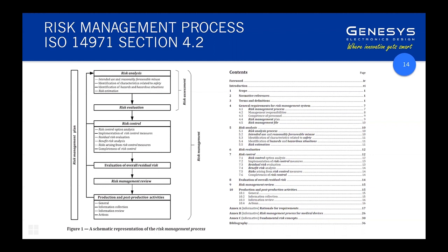To give you an example, for a relatively simple device, you would probably have at least 100 entries into the analysis table looking at hazardous situations and analysing them, and probably a similar number, of the order of 100, specifically related to software. And so it does become quite an onerous process. Even for a simple device, you should be thinking about many person months of endeavour to go through this risk analysis process. So having identified those hazardous situations, we need to estimate the risk.